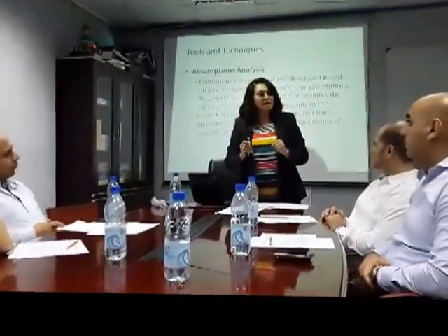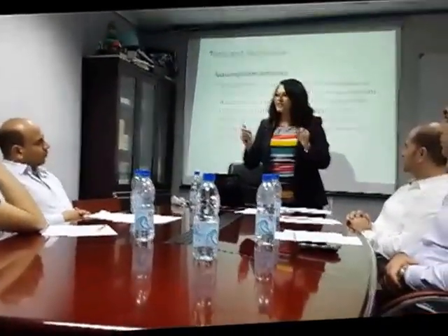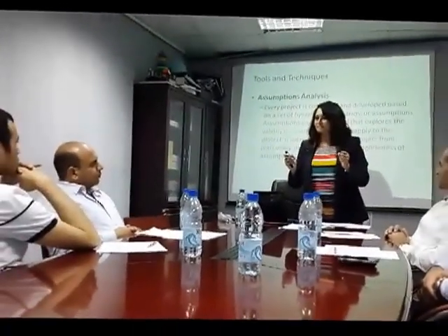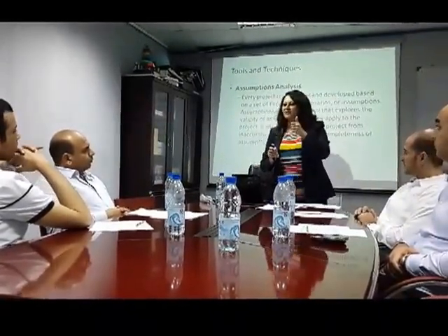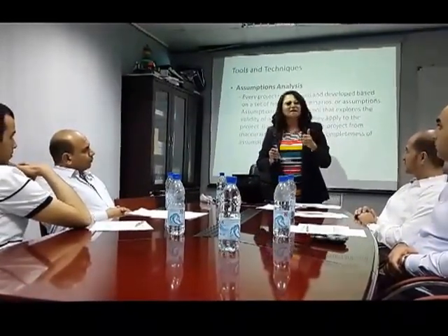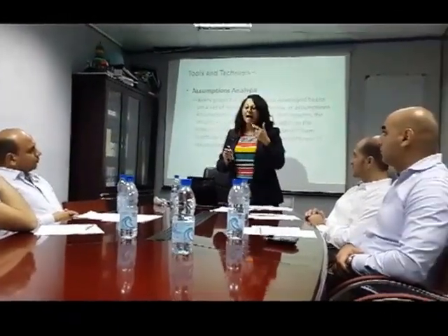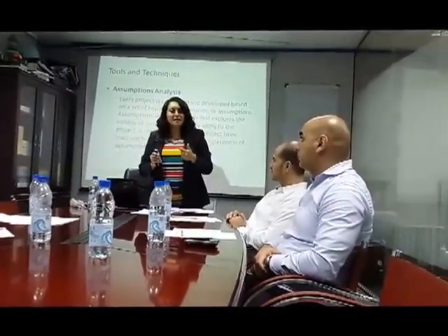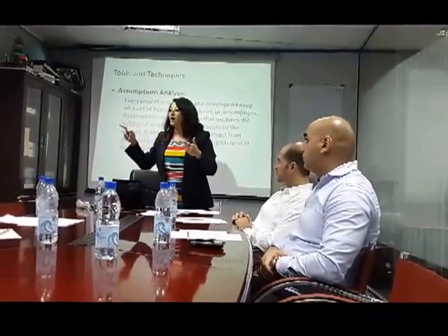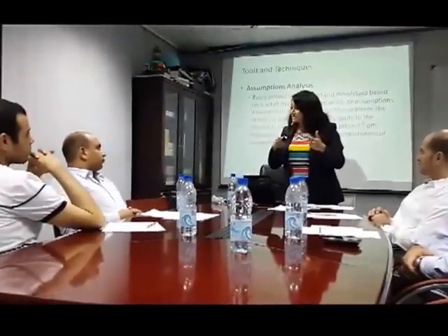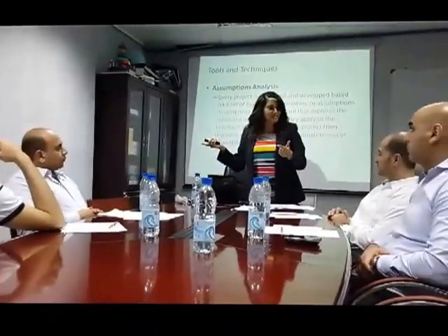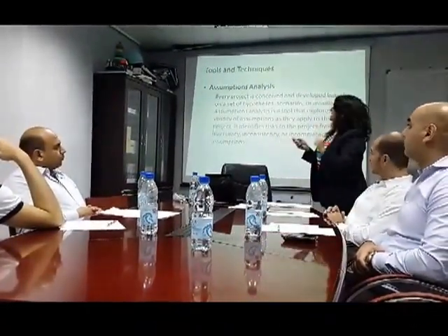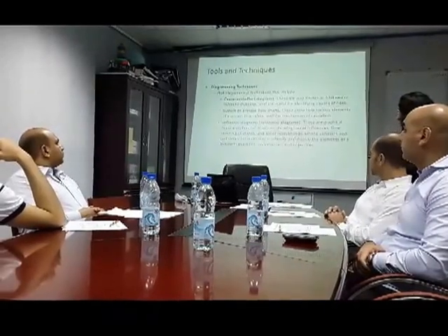And I go on with the project. Now, do you think that there's a risk here? Yes, there is a risk because I assume that my staff are all going to be trained. What happens if I do not get the chance to train them all? What happens if the learning curve extends to a month or two after the training? I will have started my project, and this is going to delay the whole project and disrupt all my plans. See, so assumption analysis is very important.